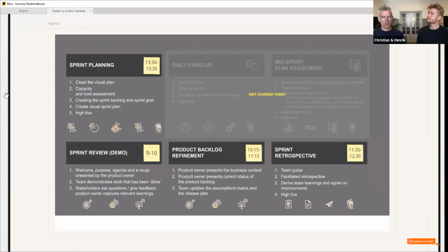It could also easily be a 1-month sprint. So if you look at the bottom, you see it says sprint review. That's the first session. We did that in the morning. The demo, where the purpose here was actually to demonstrate what the solution looks like now. You know, a show, don't tell meeting. It was not about talking blah, blah, about how much we've done and not done. So it was actually showing it, putting it together, seeing how it looks like. That was being demonstrated. While that happened, stakeholders, sponsors, and customers were not allowed to say anything, but were allowed to capture notes and, you know, present later on as feedback.